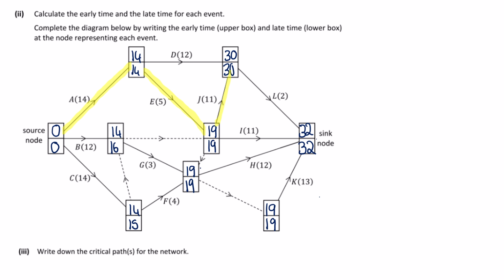We have a few other ones that could be. So 19 plus 11 is 32, and it's like, nope, okay. L could be, so 30 plus 2, 32. Yeah, so L is. What other ones? So H could be 19 plus 12 gives 32. No. But what about K? 19 plus 13? Yes. So K is.